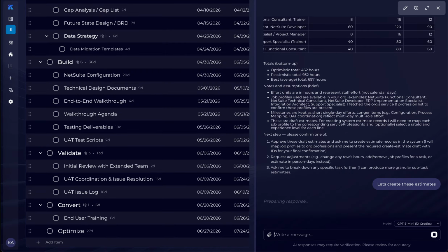So once this is done, I'm pretty sure we should see a cost associated with this project, because for each of the job profiles, we should already have rates in our rate card. And if we don't, we can ask the assistant PM to go fetch the cost of labor. Actually, it fetches the average rates from Bureau of Labor Statistics and a few other sources, and it does that for a particular geography.